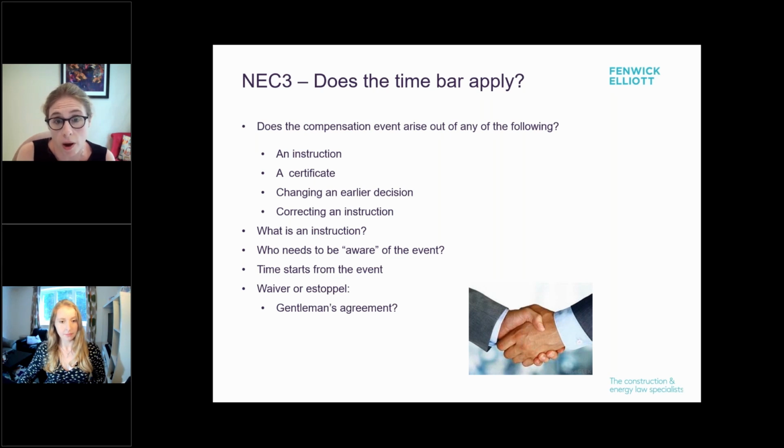So does the time bar apply? Sometimes there's a debate about what is an instruction. We all know that just because something says it is not an instruction, or doesn't say it is an instruction, it may still be an instruction. And I've certainly had disputes surrounding those sorts of arguments. You need to look at the document in the round and make a decision as to whether it is an instruction. If you are in any doubt, then obviously you need to notify.